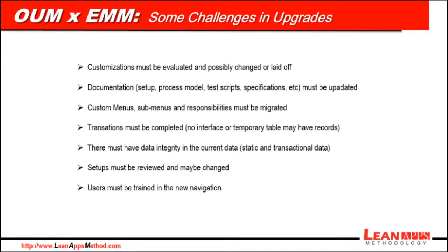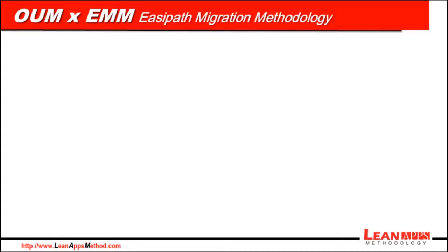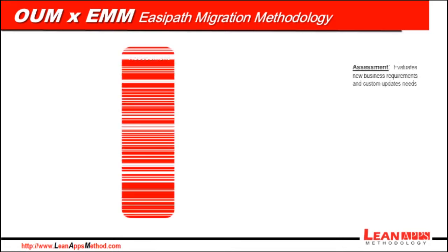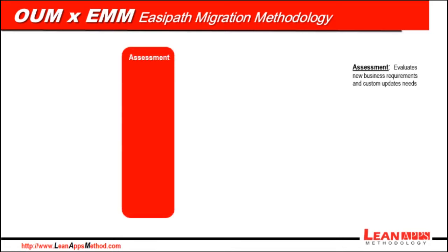Now we're going to see the main phases within EMM, Oracle's migration methodology. First is migration assessment, and the goal of migration assessment is to analyze the impact of the application release changes. Here we evaluate new business requirements and custom update needs.